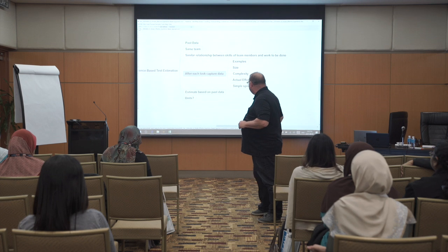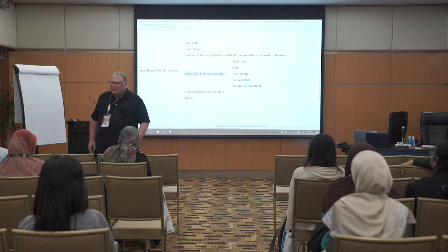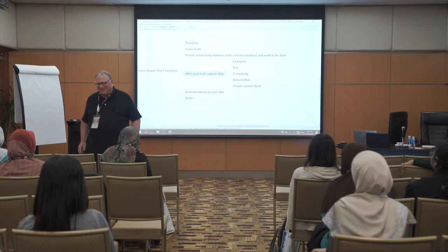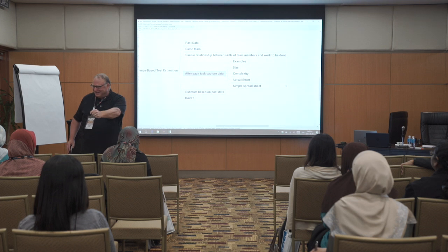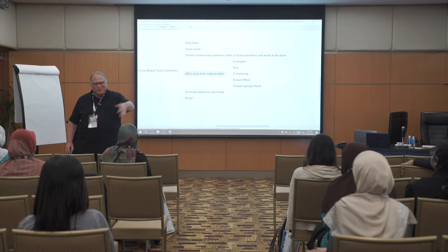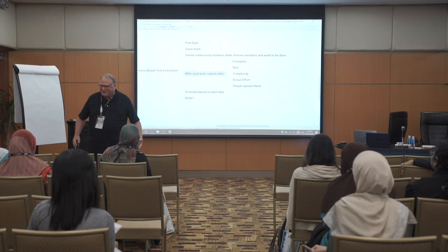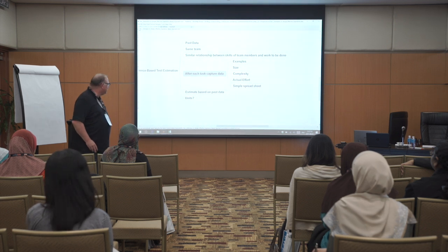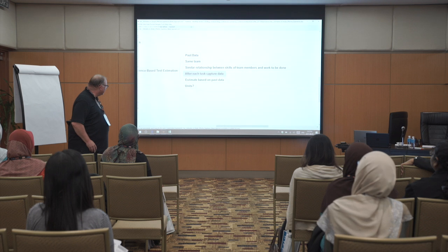We capture the actual effort. So when you finish a task, you'll tell me, well, that was a small task with a normal complexity, and it took us 3 sessions. I have the size, the complexity, and the actual effort. That's all we do. And you collect it when it's finished. Of course the tester knows they just finished it. It's not abstract. It's not from a timesheet. It's a collection when a task is finished. And I put it in a simple spreadsheet. Then when I do my estimate, I use that data to make the new estimate.